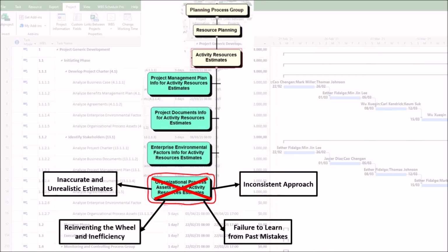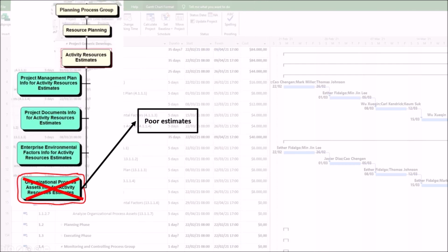In conclusion, poor estimates created by a flawed analysis of organizational process assets spread, causing serious damage to the overall health of the project. First, schedule delays. Underestimating the number of engineers or equipment needed means tasks will take longer than planned. Overestimating can lead to resource idleness and budget waste, but the main schedule risk is delay due to insufficient resources.